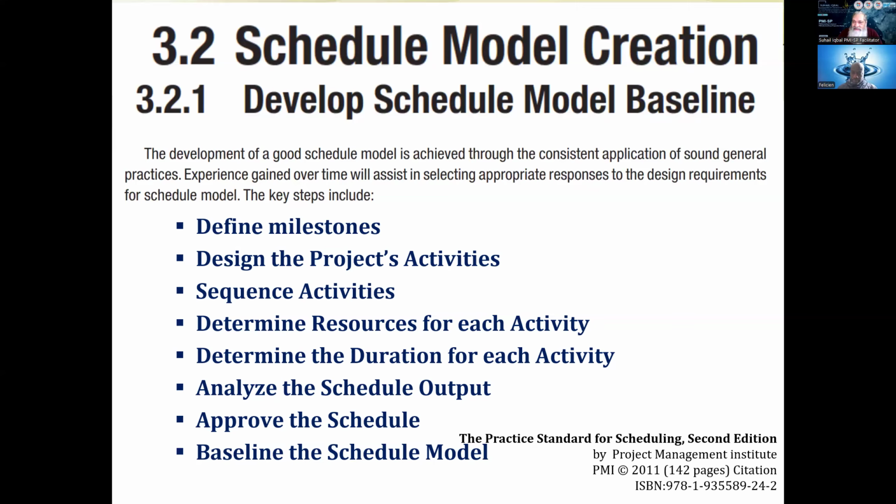If you feel there is a change required, you can move a change request, or for that matter, anyone could have moved the change request. Your customer could have moved the change request. Your stakeholders could have moved a change request. Anyone can move a change request. Then your team will analyze that change request and suggest it to the higher authority. They will review your proposal, and if it is viable, they will approve it.